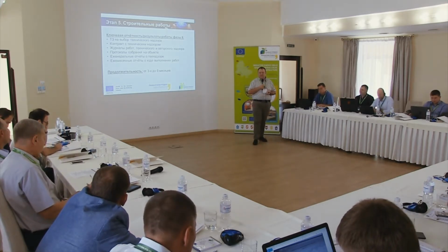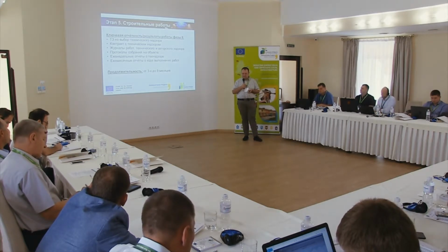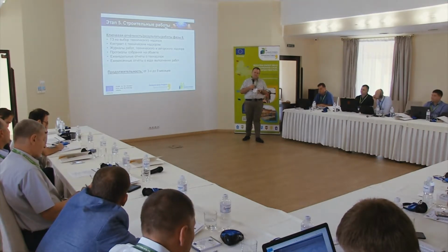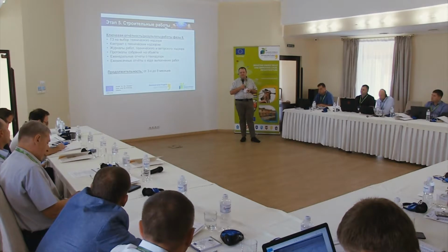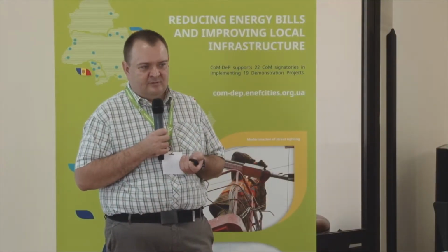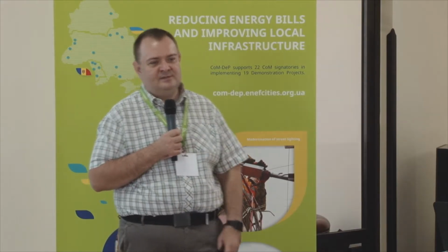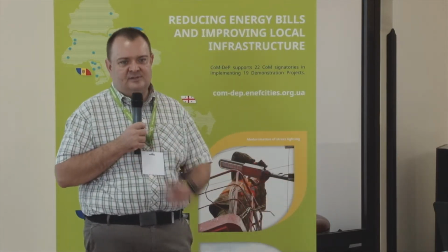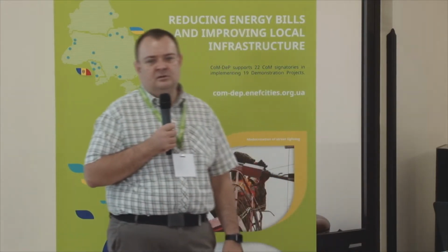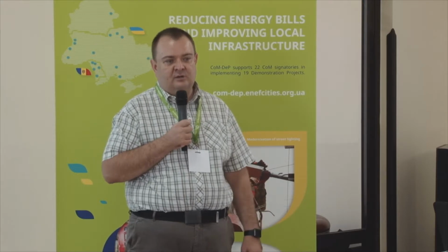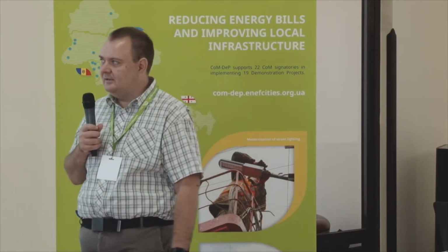At least once a week, the manager of the project, site supervisor, representative of the contractor, and in case it is necessary, representative of the design company should be present at the site, should follow the progress of construction works, should discuss different things, because the experience of the first stage shows that official correspondence, either via direct mail or email, is not efficient enough in comparison with the meetings at the construction site, when you can see some deficiencies and defects, when you can touch them and quickly find solutions to some problems which are inevitable during construction stages.